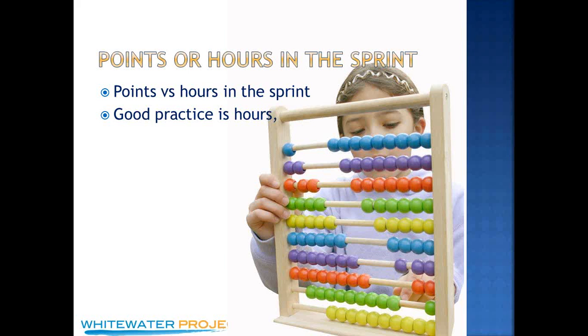So the standard approach is you come to the sprint planning meeting, you come together and you talk about, okay, in this sprint we have Thanksgiving or some national holiday where we've got a day off. So if it's a 2-week sprint, instead of having 10 business days, we have 9 business days. And then you find out, well, so-and-so on the team has a doctor's appointment that's going to make them out for a full day. Another person is being a chaperone for their kids' field trip at school and things like that. So you are reducing the overall hours available to the team to do that work.